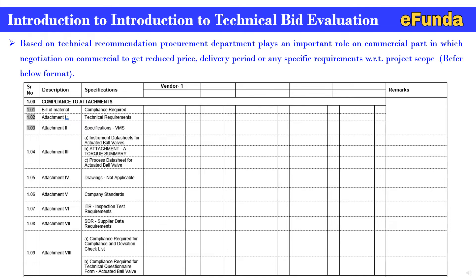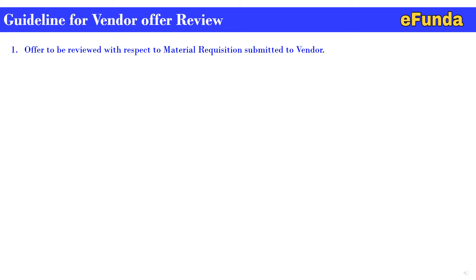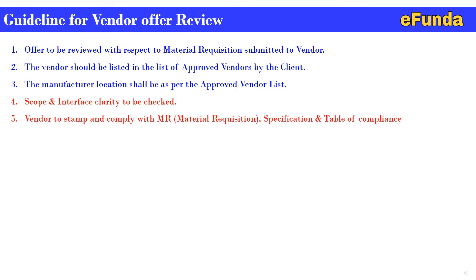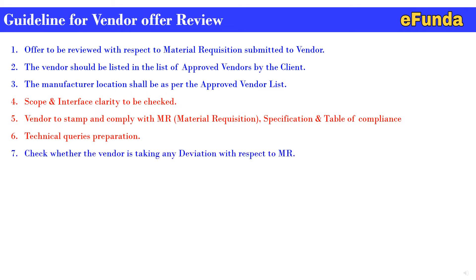One can see Bill of Material, Attachment 1 through Attachment 8. This video can be correlated with respect to our last video on material requisition, and that will help you to understand the Technical Bid Evaluation format as well. Moving on to Guidelines for Vendor Offer Review. First, offer to be reviewed with respect to material requisition submitted to the vendor. Second, the vendor should be listed in the approved vendor list by client. Third, manufacturer location shall be as per approved vendor list. Fourth, scope and interface clarity to be checked. Fifth, vendor to stamp and comply with the material requisition specification and table of compliance. Sixth, technical queries preparation.